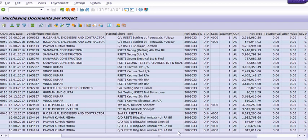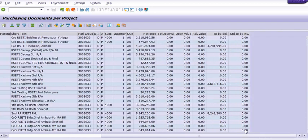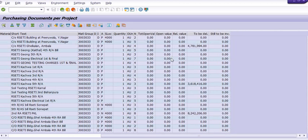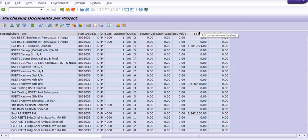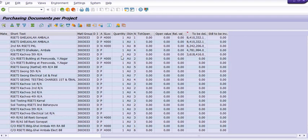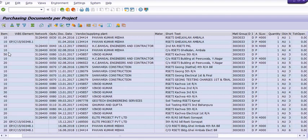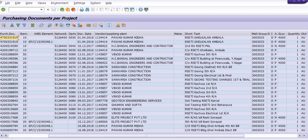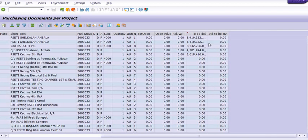Our main objective is the 'to be delivered' and 'still to be invoiced' columns. If we select this column and apply descending order, we can see this purchase order is still to be delivered for this amount.